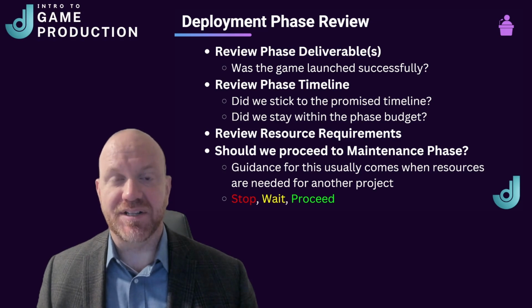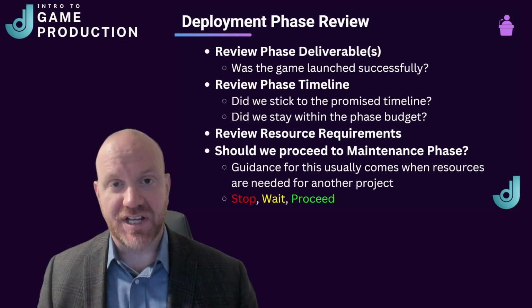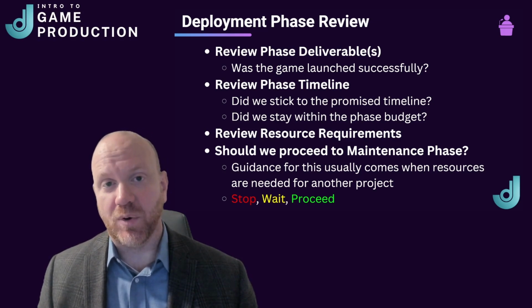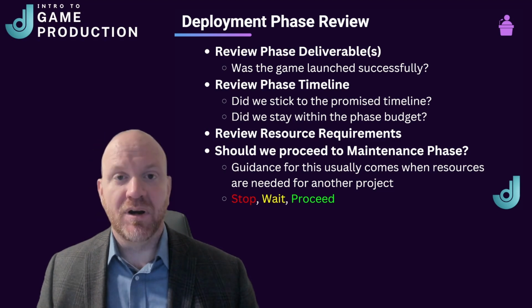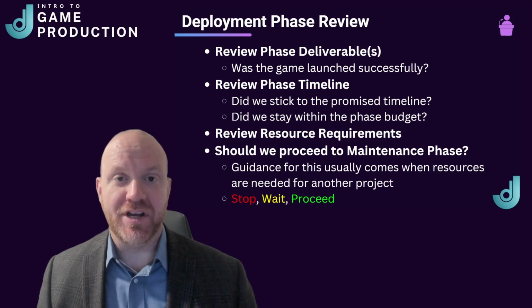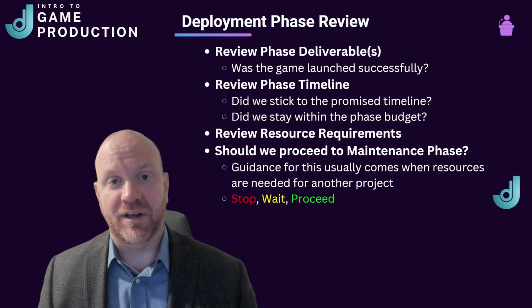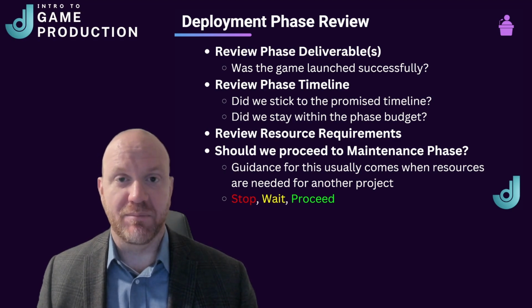And we want to assess, was the game launched successfully? Did we meet all the requirements? Are there any lessons that we can learn for next time? And this is a really good time to have a quick check-in while everyone's memory is still fresh. We want to review the timeline and budget and make sure that we stuck to our original timeline and budget. We want to review the resources, and at this point it may be a good time to address what resources could be moved to other projects and what resources we need for ongoing support of the game.